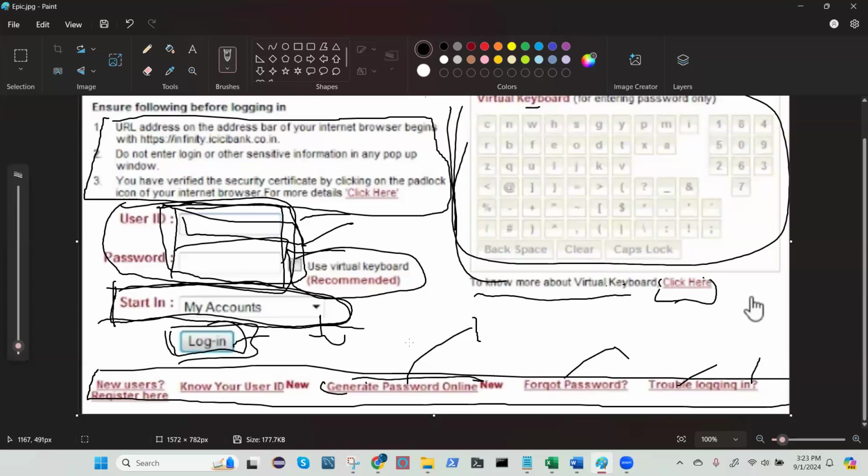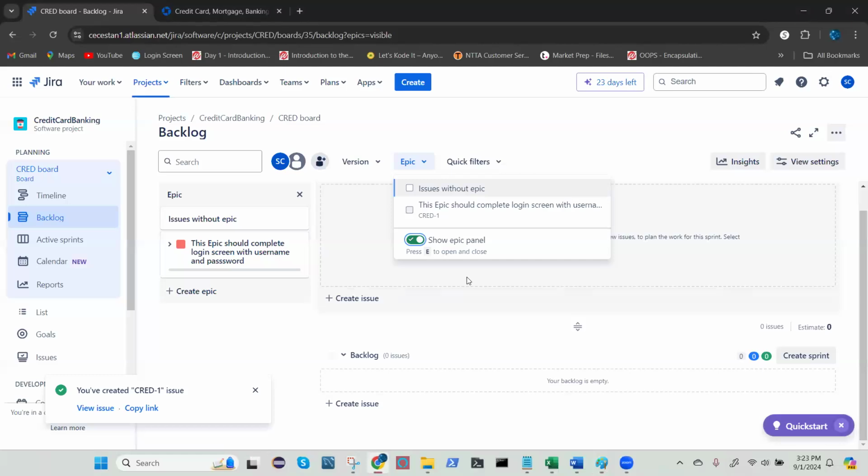All right. And the max we can have is 15. Yeah, next week again, after we're done with that. You remember, if you follow the last section, I told you about how it's being done in industry. After the sprint review meeting, we go back again and pick from the buckets, from the product backlog to the sprint backlog. We commit 15 again, then we go into another sprint.